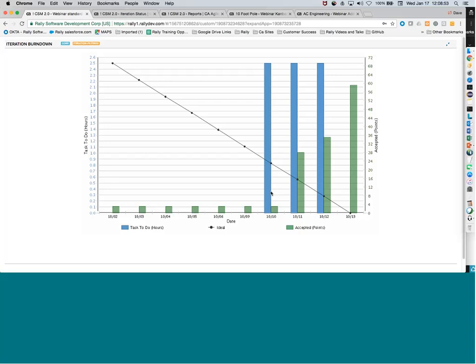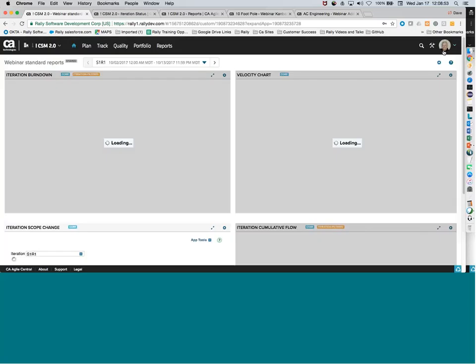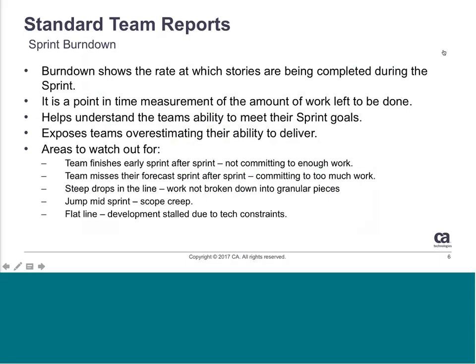So you can see what the report is showing you is the different items that were added, and we can see there's a considerable amount of work added to this particular sprint, and that's certainly going to have an effect on the teams. So having new stories added, dropping stories, all these kinds of changes are the kind of churn that we're trying to avoid. Using something like this to identify those changes on a regular basis can help stop this from happening.